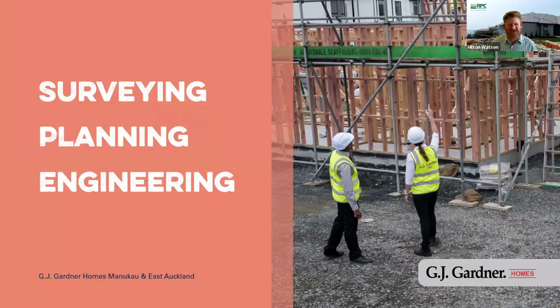Yeah, Graham, one of the first things that a client would have to do is undertake a topographical survey. And that's where we would survey everything that's on their site at the moment. So the ground, all physical occupation, buildings, fences, garages, notable vegetation. We'd also have a big picture sort of look and see in terms of the development and where the client wants to go, what public infrastructure is nearby that we'd need to survey, identify, do some research on grades and invert levels for the drainage, find out where water, power, phone and connections all are, and sort of a big overall foundation of what's going to happen for the project. So that'd be the first step.